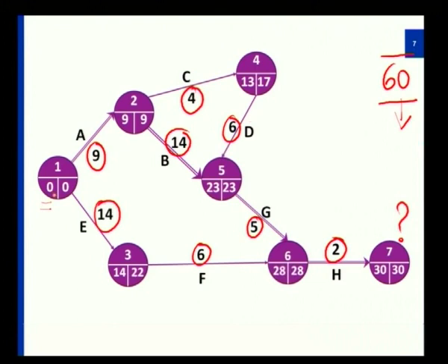I have taken part of the table, but this 0, 0 would indicate the early start and late start timing. What is this early and late start? Supposing that the project has to start at 0, when will I complete? 9 weeks is the time given for activity A. If I start at 0, then it takes 9 weeks, so I will be able to complete it in a maximum period of 9 weeks for doing activity A alone.